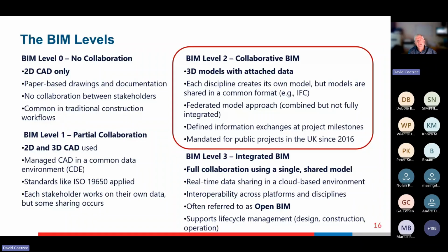And now, as that work starts to wind down, my focus as an asset management guy again is hammering particularly the MEP guys, but all the different disciplines, to make sure that they create the attribute data that the client has required from them, and that it is captured in the model so that it can be transferred at completion across to the CMMS, EAMS, and facility management solutions.